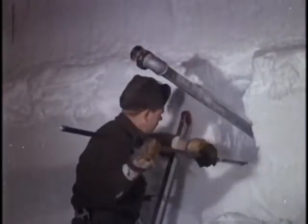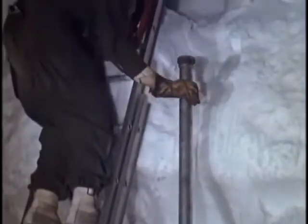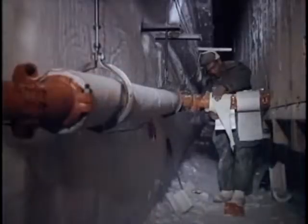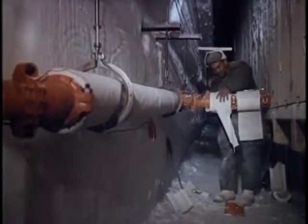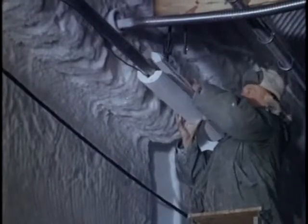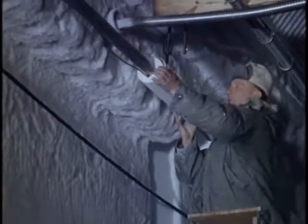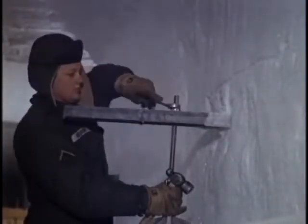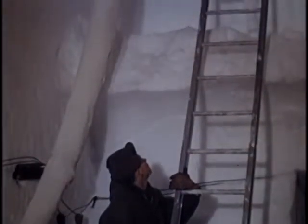At the same time, within the tunnels already completed, we were installing piping for water and electricity. Heavy insulation material was wrapped around every pipe to protect against the extreme cold. A copper heating element inside the insulation kept water lines from freezing. Flexible sewage lines also had to be run through the camp. At this time, to keep on schedule, we were using 12 and sometimes 14-hour shifts.